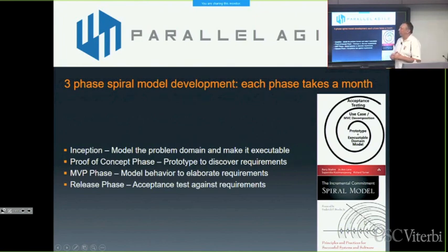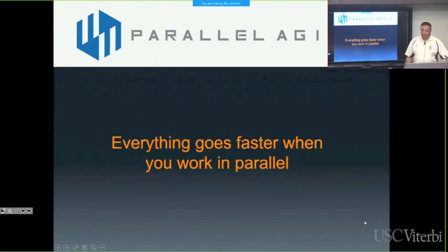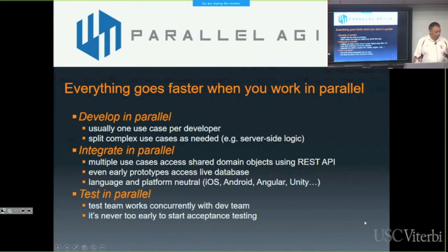I'm not a big fan of time boxes because I think time boxes cause people to rush their code and not handle all the rainy day cases, and it gets stuff out the door, but there's all hell to pay later. So this is not 3 hard set 1 month time boxes. It's when everybody gets their use case done, we can move to the next. Everything goes faster when you work in parallel.